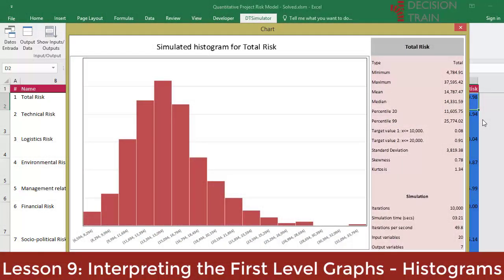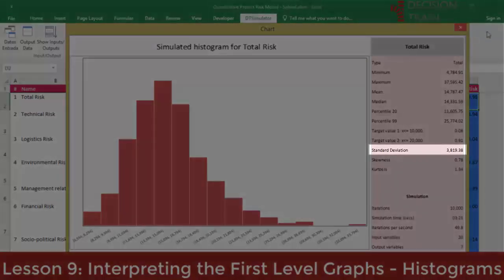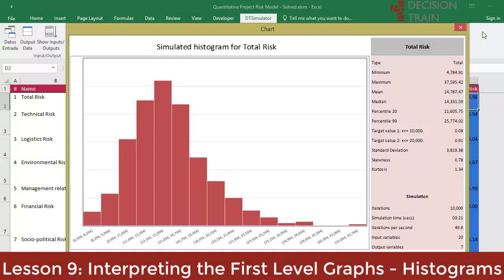Now, we go again to click on the histogram icon while the cursor remains on total risk. On the other hand, the model also calculates the standard deviation, here at an approximate value of $3,800. Remember that the standard deviation measures the average distance of variation of the data from the mean, in this case $14,800. However, this indicator does not say much since the true power of the standard deviation is when the distribution tends to be symmetric, and this is not the case here.